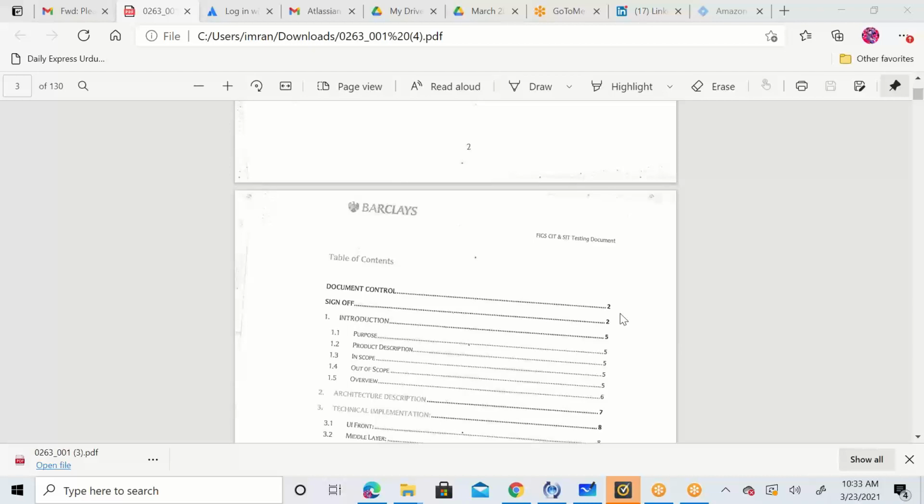It will be every single thing you will be redoing. So that means if you are designing those new features, when these features are going to be tested, they cannot be tested alone. You need to do whole testing of the system again. That is called regression testing. Even though you know those functionalities are working properly, the new functionality might hurt the performance of existing functions as well, so they want you to test the whole system again.